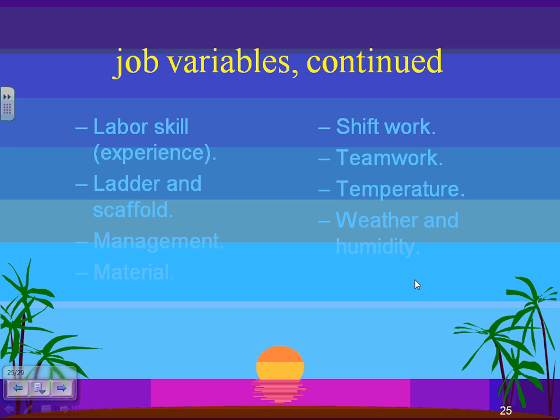I thought the first shift is the normal shift, 7 to 3:30. That's a shift for electricians, 7 to 3:30, 4 o'clock. So single or married, you don't increase your labor. If you go second shift, now you're getting into probably 4 o'clock until midnight. That's the way I define second shift. If you are a married man, you have children, you have to go make supper, and your wife or husband is yelling at you that you need to be there. So if you are making me work that particular shift, you need to increase my labor.